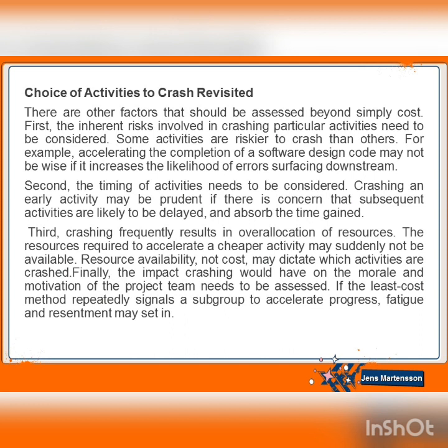Second, the timing of activities needs to be considered. Crashing an early activity may be prudent if there is concern that subsequent activities are likely to be delayed and absorb the time gain. Third, crashing frequently results in over-allocation of resources. The resources required to accelerate a cheaper activity may suddenly not be available. Resource availability, not cost, may dictate which activities are crashed.